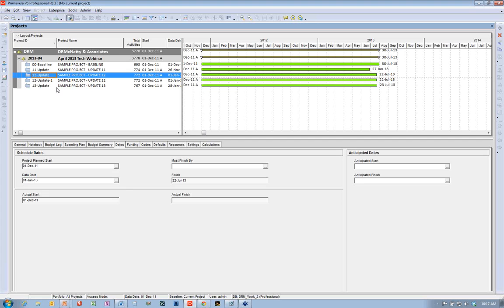every client has their own database. So these are the only projects within this database. This makes it easier to comply with legal requirements when the project's done and somebody wants a copy of the database. And so I don't have my client files intermixed. In order to do that, you need to be using the Microsoft SQL database. That allows you to have multiple databases on a local install of P6 Pro, or even on a hosted install. We commonly have P6 users that have multiple databases.